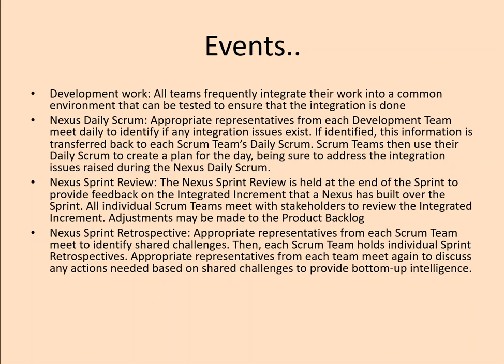Then we have the Nexus Daily Scrum. As I have said earlier, appropriate representatives from each development team will participate in the daily Scrum to identify if any integration issue exists. If identified, the information is transferred back to the Scrum team's daily Scrum so that they can take the action.